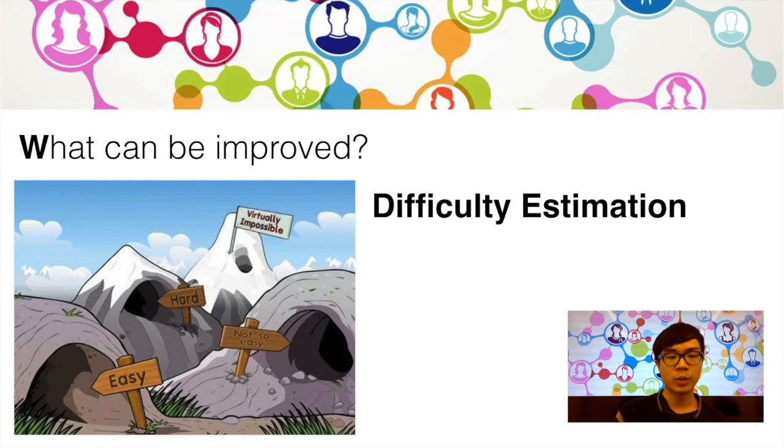So, what we did not do well is the estimation of the difficulty and effort of features. Since we distributed the workload based on the difficulty and effort of each feature, imprecise estimation led to unbalanced job assignment. This phenomenon is especially significant for our front-end system. Some features were far more complex than we had expected in the planning phase. Hence, the front-end developer put lots of effort and time into developing features beyond our expectation.